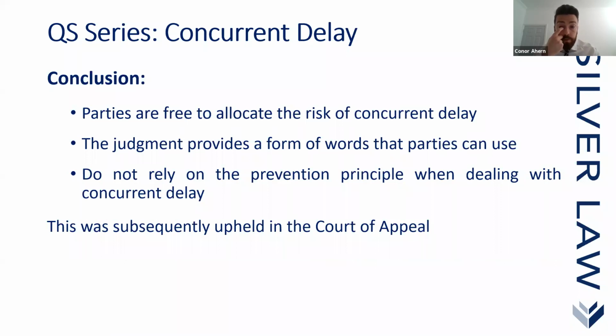So the conclusion following North Midland is that parties are free to allocate the risk of concurrent delay within their respective contracts, and it has actually led to most schedules of amendments now dealing with the allocation of risk on concurrency.